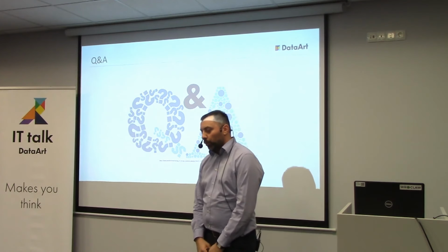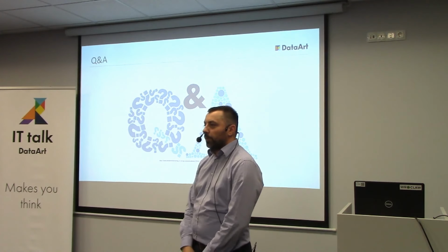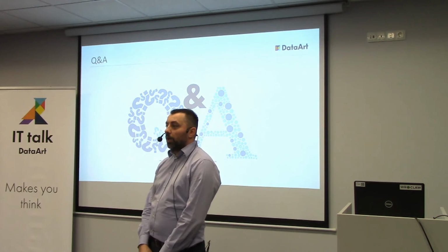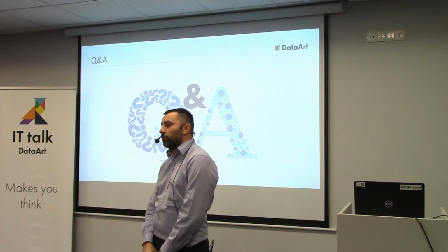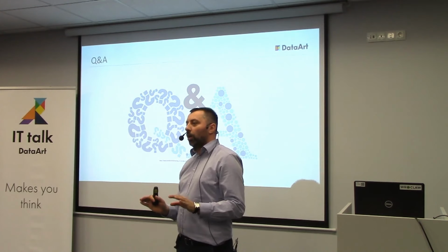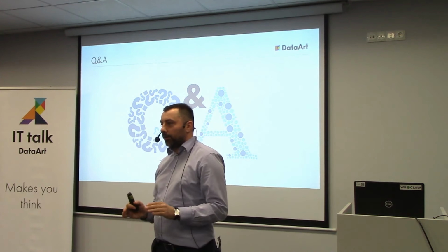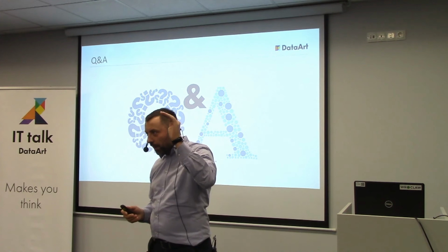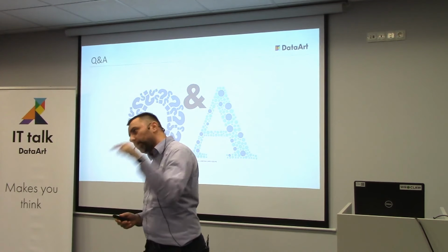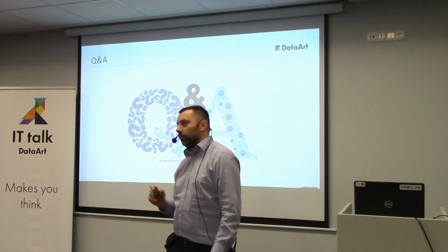First of all, you take out what you really don't need or find, personally or from the project perspective, really useless. This documentation was it. This project was the documentation. So I simply said, no, we don't specify anymore. We just fix what we have, and by the next iteration, get the information from the top level, from the functional documentation, what is asked, and we go directly to the software. So we just skip all those phases, those cascades in Waterfall.